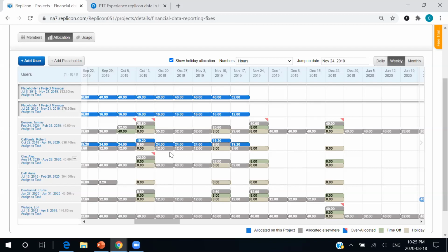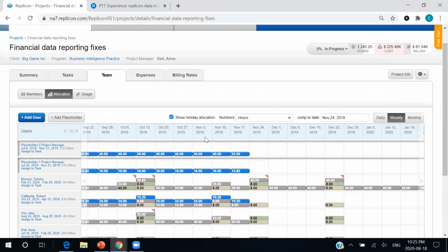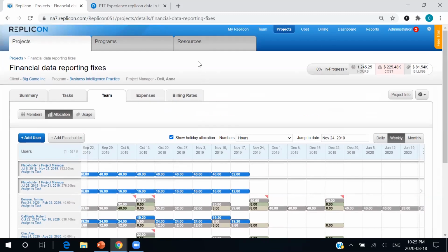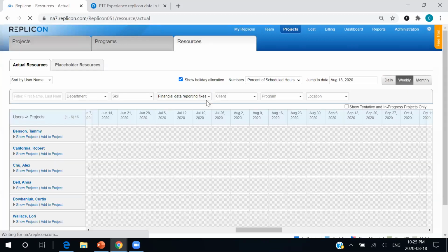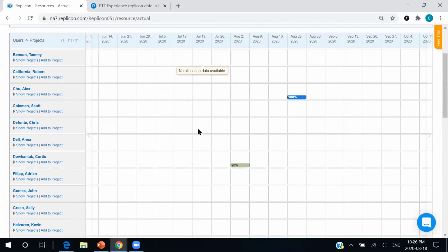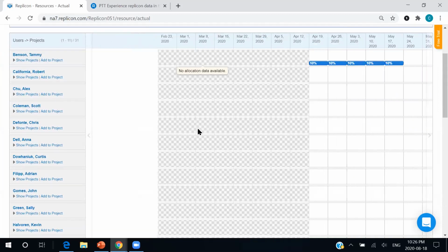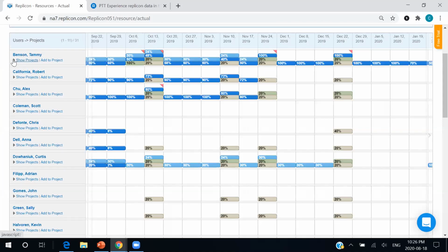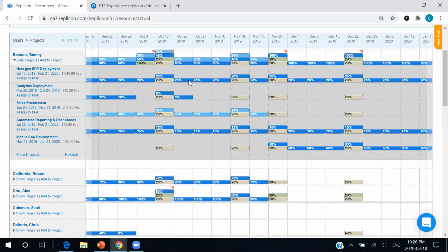And now imagine instances like this where we're able to discover we've only assigned 36 hours or 27 hours, how much more efficient we could make our organization. And we can really drill down even further into this efficiency in our resources tab. Our resources tab will break down how we have assigned every user in our organization over a specific given period of time. And here we can break this down even further and take a look at the different projects that we're working on. So again, we can understand how our utilization rates have been affecting our organization and how we can spread this out amongst the people in our organization.